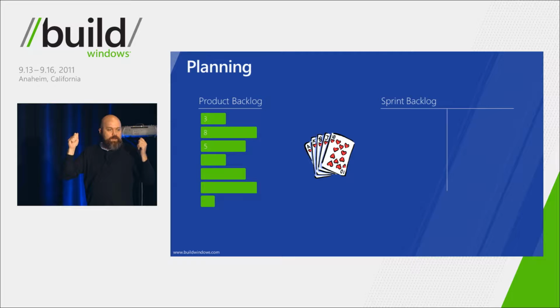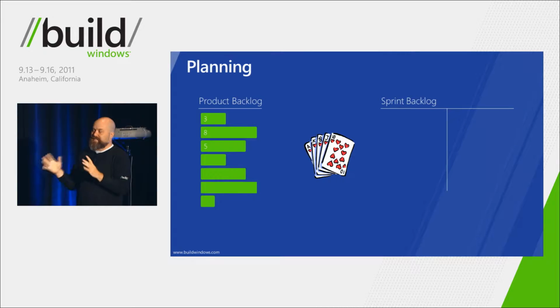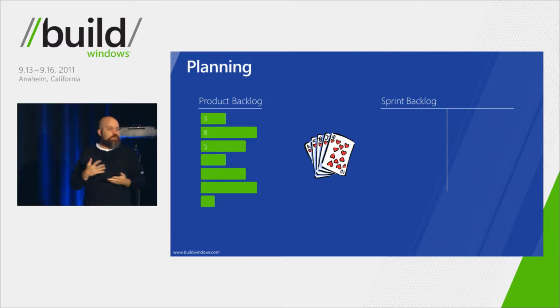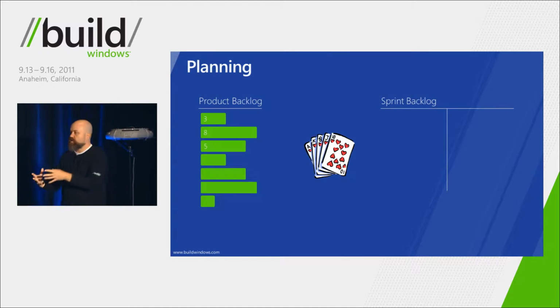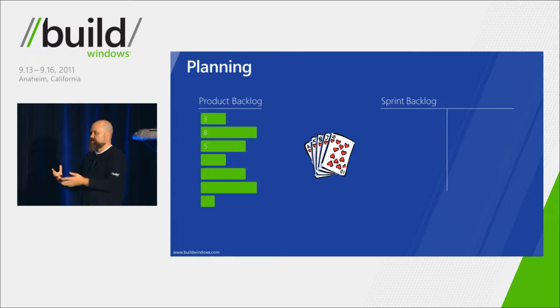Suddenly the other guys came up to numbers approaching 20. Right? We found a common ground that it was bigger than we thought. It wasn't 3 or 5. And the idea of planning poker is to encourage that conversation and to encourage a consensus of the team agreeing, this is what it is, this is how we're going to do it, this is how complex it is, and this is what it is that we're going to go and get done.